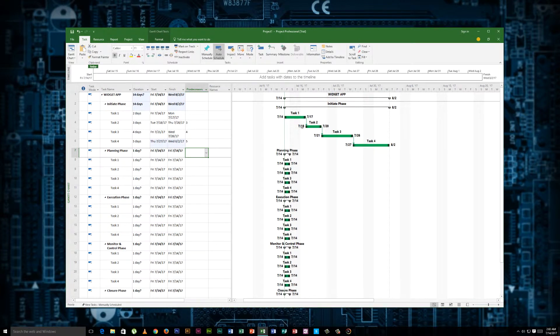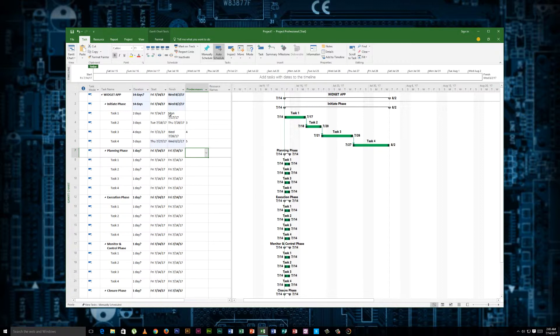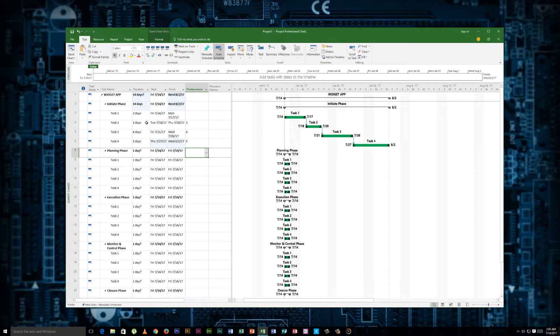This task basically cannot start until this one has been completed. And that's typically what your finish start is. If task two has a dependency on task one, it can't start until the other task has been finished. So this could be some sort of approval process or documentation completed. It really just varies depending on the project that you're initiating.